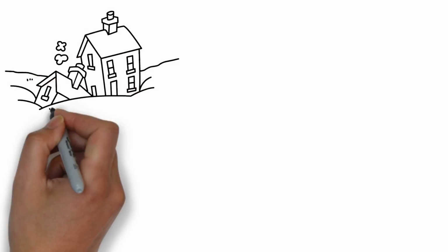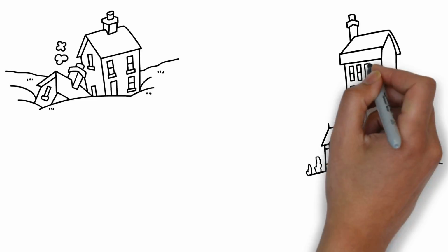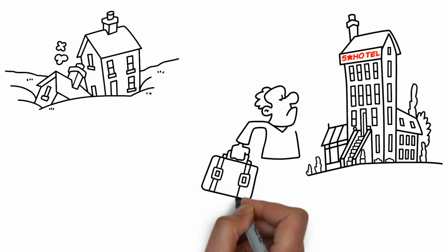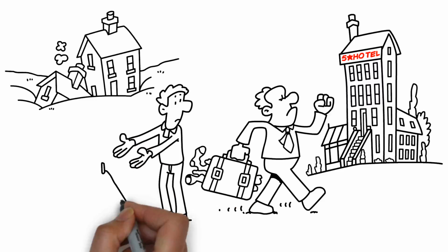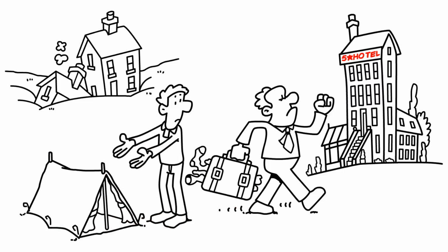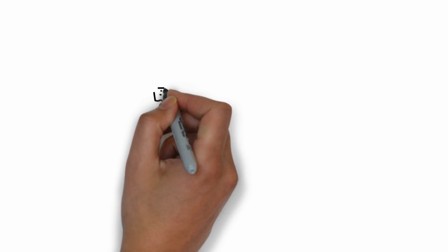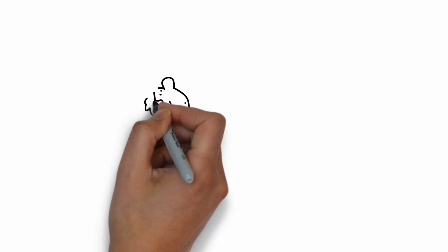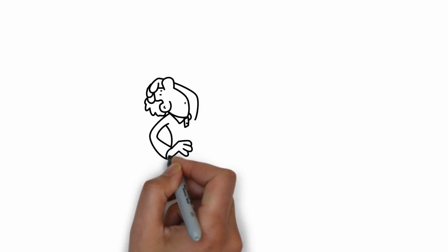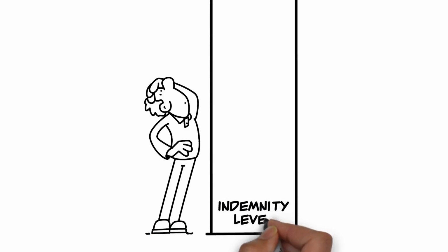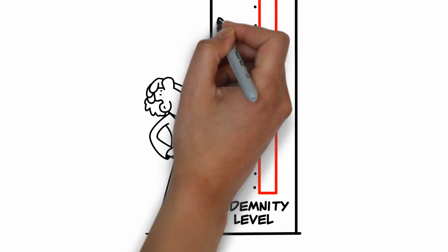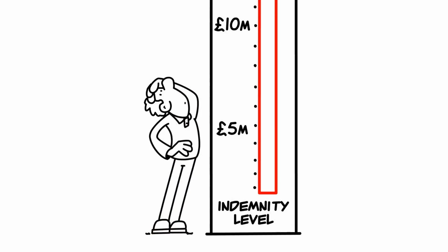The contractor's liability insurance should cover adjacent buildings as well as your own. Beware of the financial consequences of having to restore those buildings and rehousing the people living in them. Make sure that the limits chosen by your contractor seem realistic and ask them to increase their cover if the sum seems small. In London, indemnity levels can reach £10 million or more.